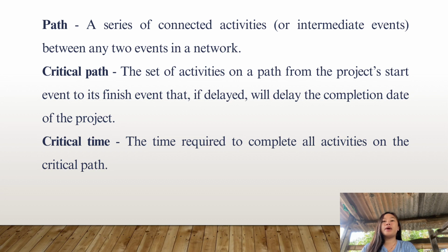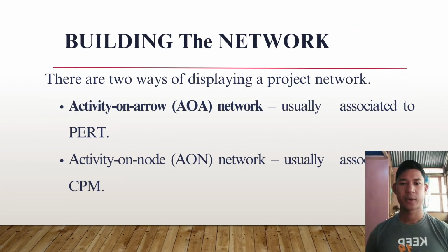It's crucial for project managers to meet project deadlines and deliver results on time. Building the network. There are two ways of displaying a project network. Activity on arrow network, usually associated to PERT. Activity on node network, usually associated to CPM.